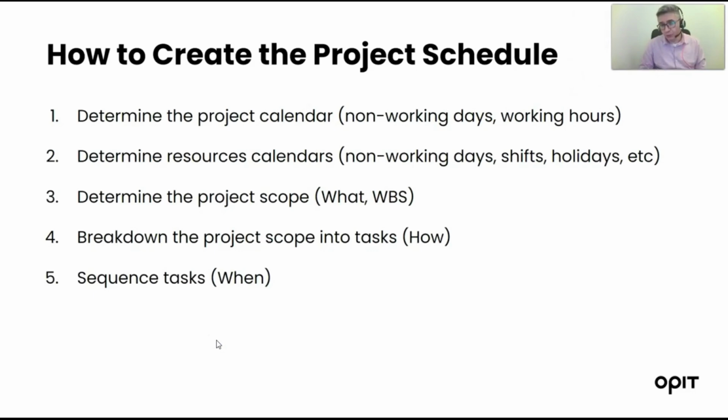Determining how we go to when, meaning sequencing, organizing, arranging the tasks in the order that they need to be executed. In this process of ordering the tasks, some tasks have a mandatory sequence, while for others we can define our preference in terms of how those tasks should be executed. There are mandatory orders and in some cases we can define in which order the tasks will be done.